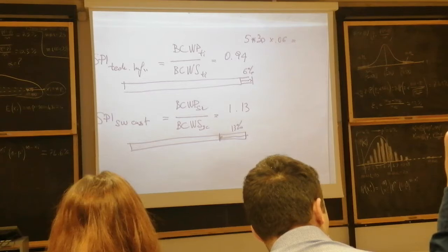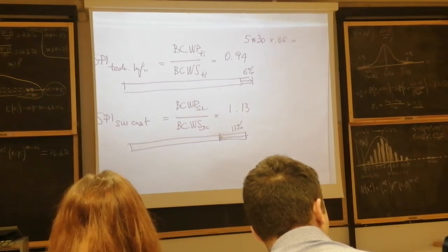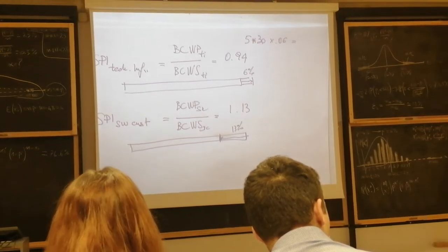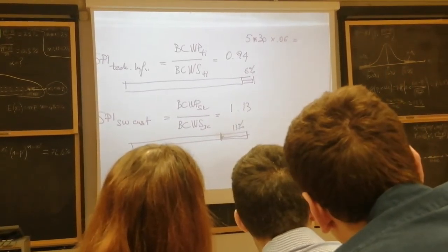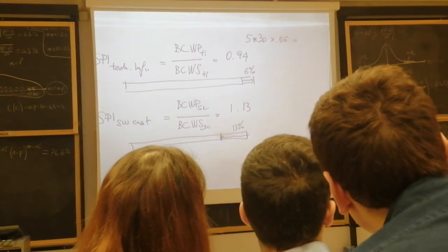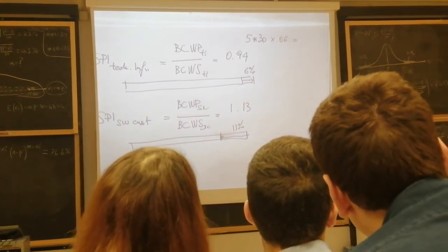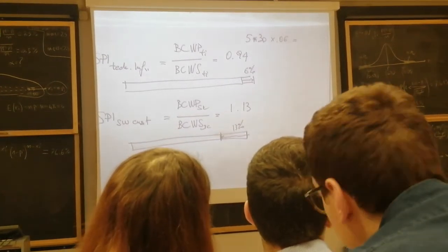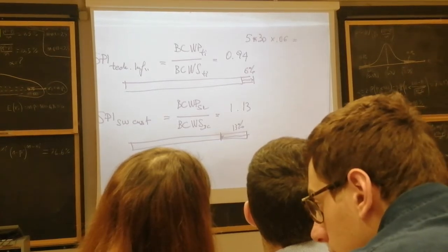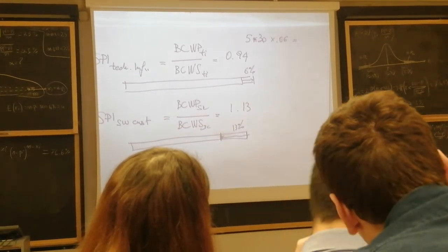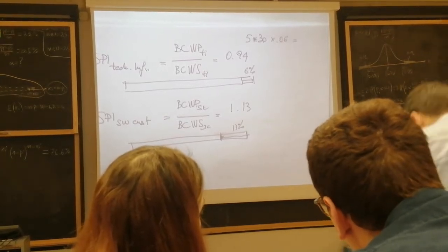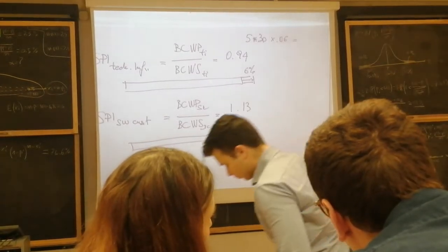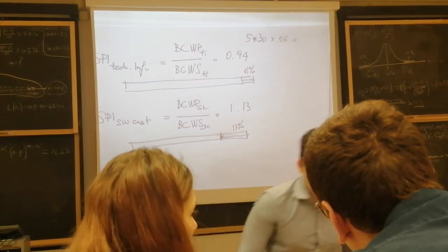That's the same. Just always use the same amount. Don't confuse them. Whenever you go with elapsed days, E days, it's elapsed days, or you go with work days. And there's a formula in Microsoft Project that converts E days into work days, just because not all months are 30 days long, and not all months are 22 work days.